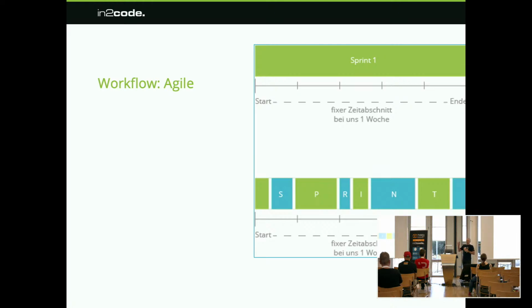Sprint means between 2 and 4 people are working on a project for a period of time, normally 1 or 2 weeks, so they can focus on the project. And the sprints are planned long in advance. The rest of the team is working on a global backlog from their team, so you can have a sprint that is divided into little subsections where the team is working. And this worked very well for us.